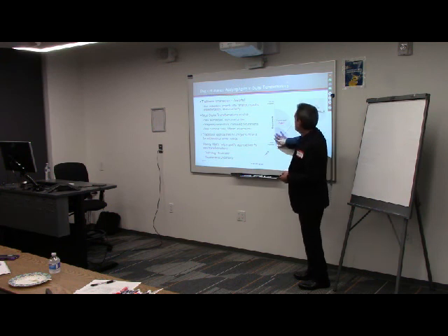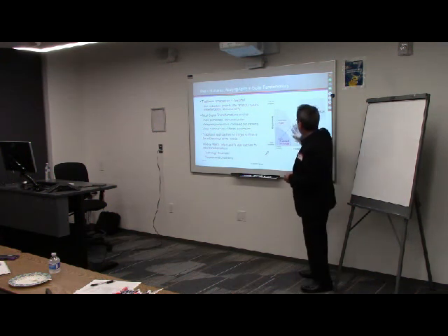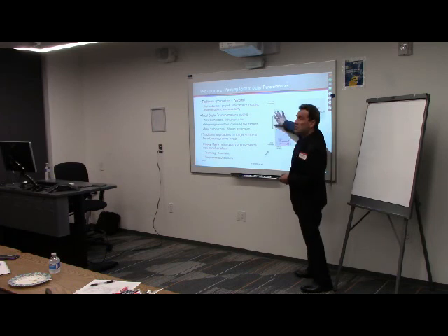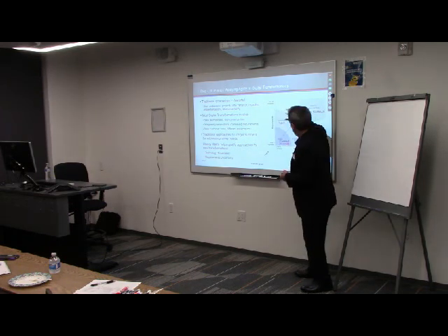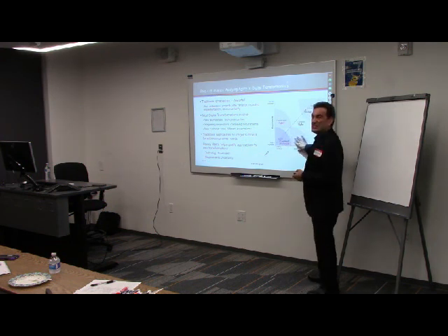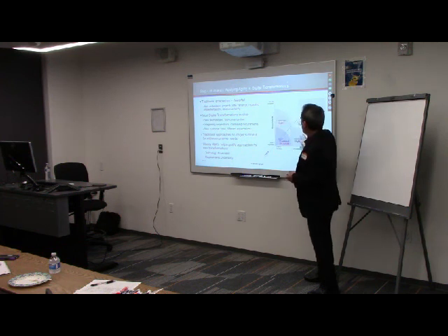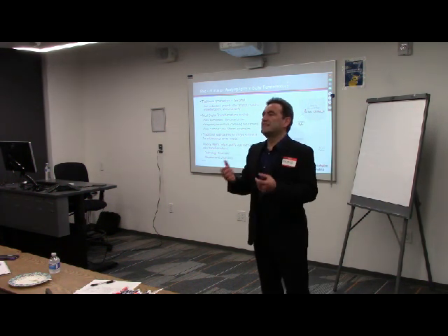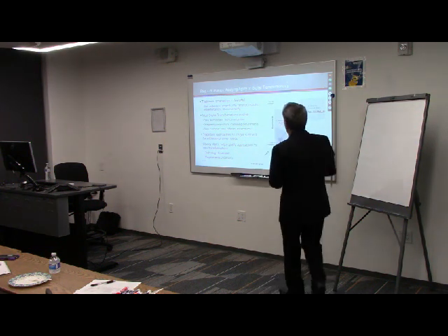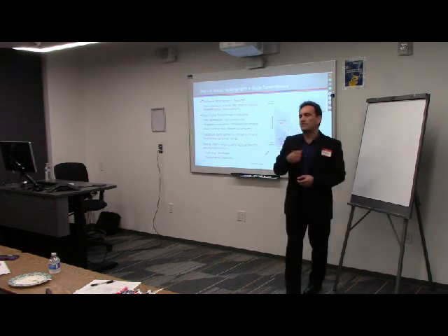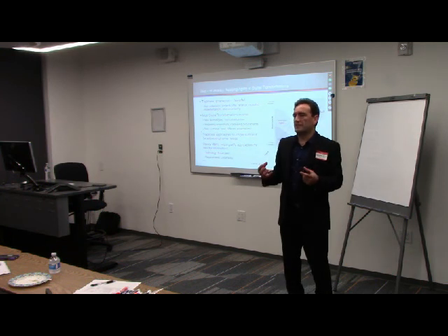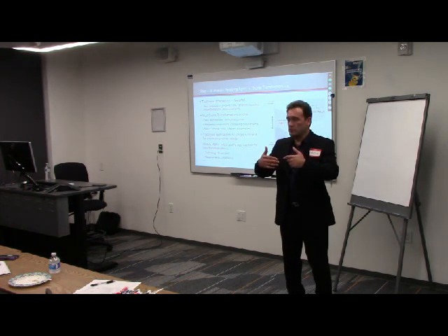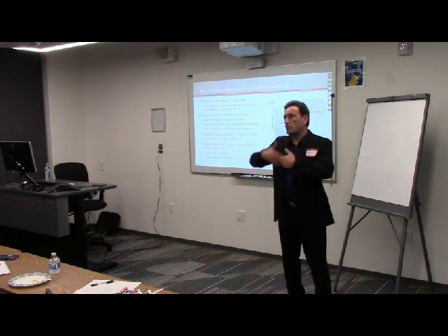The problem is that most of our projects are now on this other side of things where requirements are less known or not definable, and the technology complexity has increased. It's no longer simple. And when that happens, you start to find that there's a much better match in Agile approaches than there is for traditional approaches. And that's the difference. You'll find fewer and fewer projects that can easily be solved with the traditional approaches. You need to have more versatility, more reaction time, and be able to expect and react to changes throughout the life of the project.